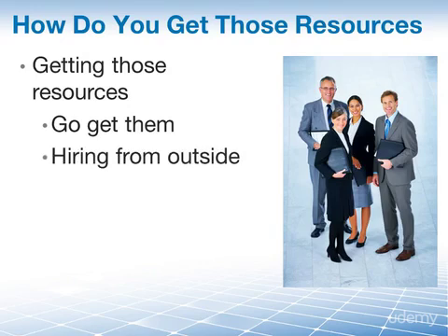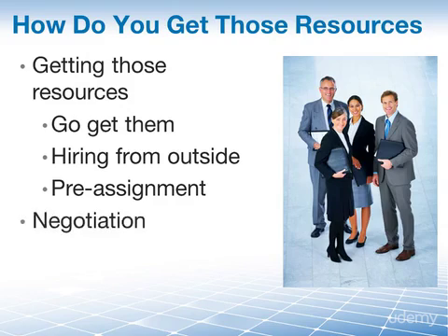Or it might even mean you get whoever they give you. You have no or little choice at all. You work with whomever was assigned to your project, also known as pre-assignment. But no matter what, negotiation is probably the technique that you're going to be using heavily to acquire the resources.